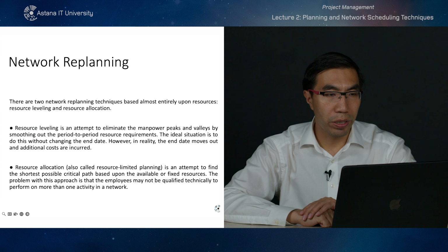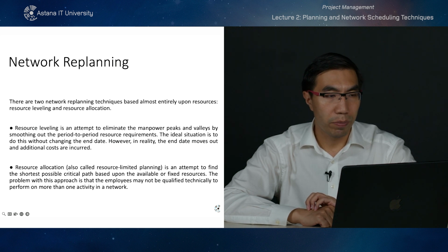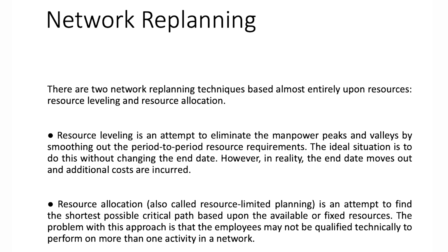And when you're working on the project, then you need to think about what kind of replanning techniques you might use. So there are two main techniques, which are resource leveling and resource allocation. So resource leveling is an attempt to eliminate the manpower peaks and valleys by smoothing out the period-to-period resource requirements. Yes, but that's not always the case because it depends on the project itself. So the ideal situation is to do this without changing the end date. However, in reality, the end date moves out and additional costs are incurred.